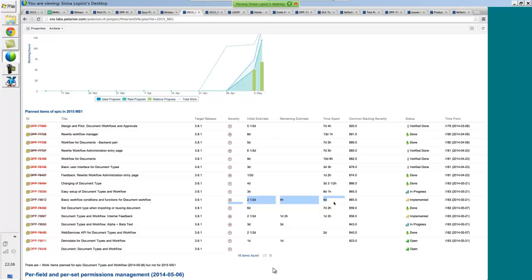And as you can see, the major thing we always try to track is the version or target release, to ensure that we have a clear understanding of what goes into which release. And there's always some leftover work or additional adjustments that need to be set into the different milestones. We don't do branching, for instance, for people who are interested in the more technical level. We tend to do it simpler, in a way that we only have one branch, and when we get to this transitional period, when we're trying to lock the code, we would create another branch.